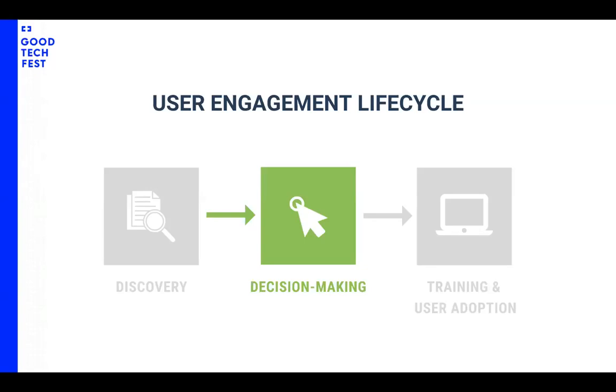Yes, so I think one other important factor to consider is the costs that will come with a particular solution. What will it cost to have your solution developed or designed? What is the cost of licenses and the other implementation costs? For example, we had to factor in the issue of phones, mobile data that they will need, and the training, the level of training, of course, that you require will have some cost implication. So it's important to factor in all these so that they fit into your budget limitation.